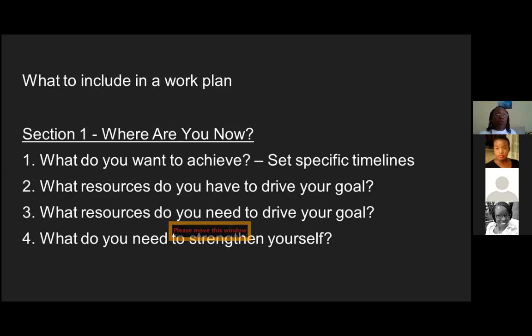So for example, if you're saying that out of these 700 non-school going girls, you want them to access education in the next 5 years, that's your broad goal. Now you break it down. You say, what am I going to do in the next 5 years? Okay, year 1, what will I do? In January, I will ensure that out of these 700 girls, I have given them a brochure about education or school. And then in the next 2 months, you break it down like that into small and